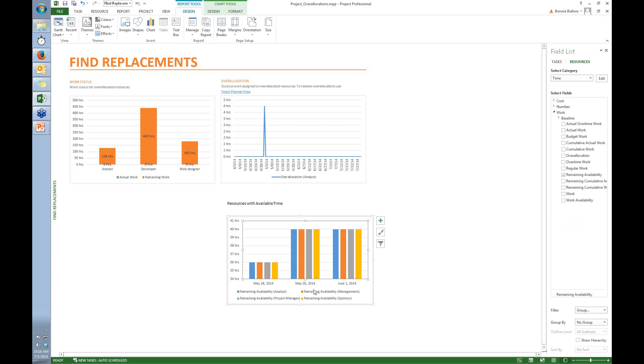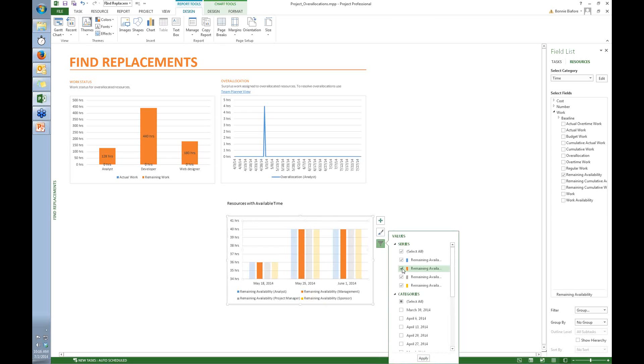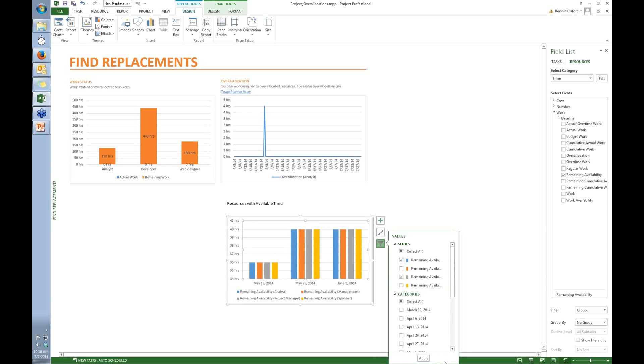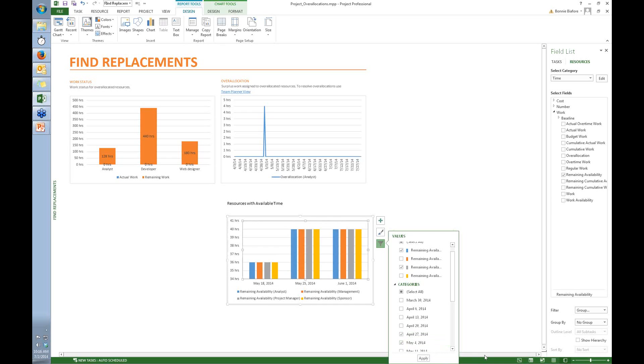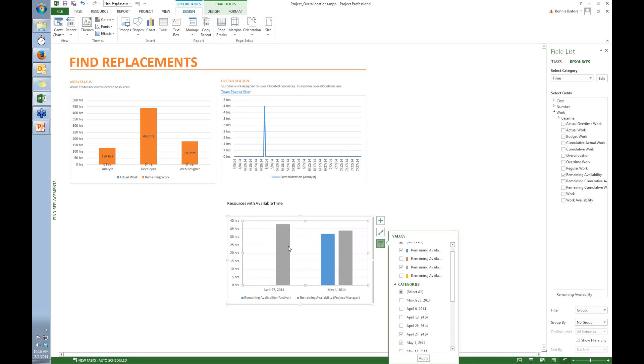Well, now I've got here are some resources. I'm not going to assign the management team to a task and we're not going to consider the sponsor either. So I turn those two off and then I'm going to again filter and only show the weeks where the over allocation occurs. So that looks like it's right about here and click apply. And so now I see that the other resource that actually has some availability is the project manager. So maybe I could reassign the task that the analyst was working on to the project manager.